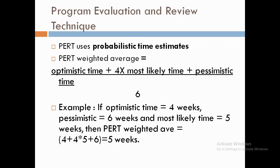The last scheduling tool is the Program Evaluation and Review Technique (PERT), which is useful when there is uncertainty regarding activity duration. It uses probabilistic time estimates — the optimistic, most likely, and pessimistic times discussed earlier — and applies a formula using these estimates to give the time to be used for a specific task when scheduling the project. For example, if the optimistic time is 4 weeks, the pessimistic time is 6 weeks, and the most likely time is 5 weeks, then the PERT weighted average by the formula is 5 weeks, which is the time that should be used when scheduling that task.